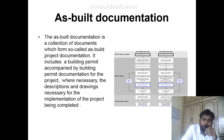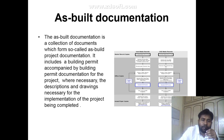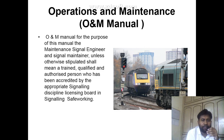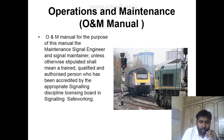As-built documentation is a collection of documents forming the as-built project documentation. It includes building permits and documentation for the project where necessary, along with drawings necessary for the implementation of the project. The operations and maintenance manual — O&M manual — is for the purpose of maintenance by signaling engineers and signaling maintainers, who are trained, qualified and authorized persons credited by the signaling discipline licensing board.